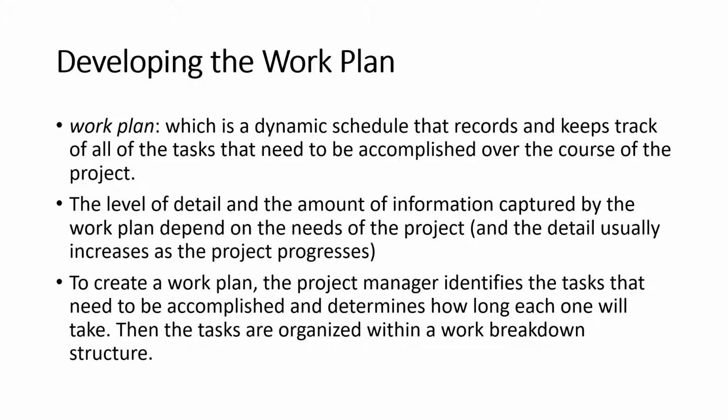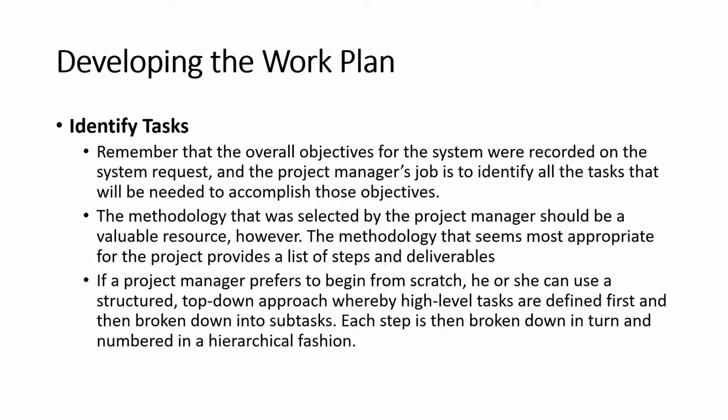So in order for you to create a work plan, the project manager identifies the tasks that need to be accomplished and determines how long each one will take. Then the tasks are organized within a work breakdown structure. This is actually connected with your user stories, the ones you created before, that identify the different parts of the system that you're going to do, in order for the project manager to convert them into tasks.